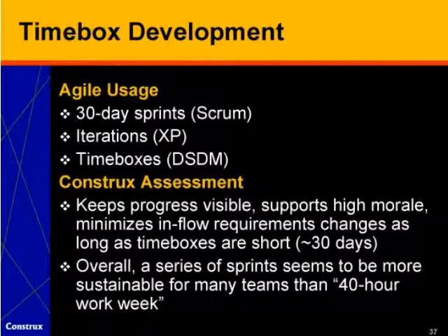A third practice that we've seen work well is Timebox Development. In Timebox Development, the idea is that you give the development team a rigid time box within which they are going to conform their development work, and in its pure form, the team commits to delivering its committed functionality by a fixed date. And in its pure form, if the team doesn't deliver everything, the work is thrown away, and so the time box is wasted. And this is supposed to create a high incentive to actually complete the committed work by the end of the time box. And we don't see time boxes practiced in their pure form very often.